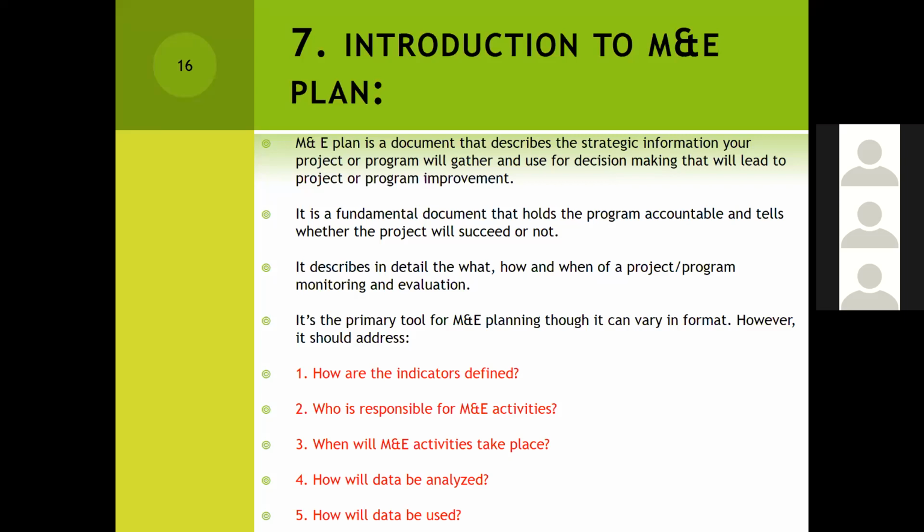However, it should address key components like how the indicators are defined, who will be responsible for M&E activities, who will use the M&E activities, how the M&E activities will take place, and also how that data will be analyzed as much as possible.